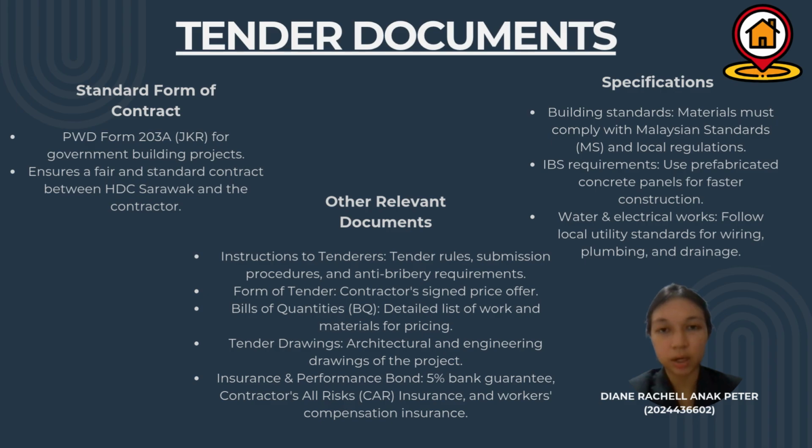Now, let's look at the tender documents required for this project, which we have organized into three main points. First, the contract. We are using PWD Form 203A, which is the JKR standard for government building projects to be fair between HDC Sarawak and the builder.